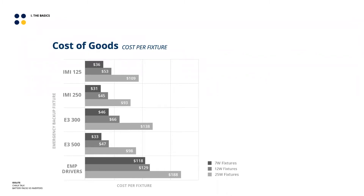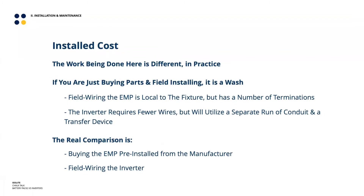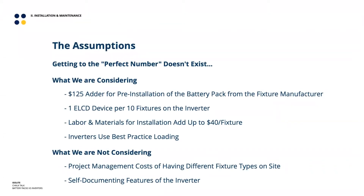This is a good way to look at it if you only care about the actual PO value of these devices, but it doesn't account for things like breaker selection or option selection on the IMI. Most importantly, it doesn't account for how you actually get this into an installation. Total installed cost is really what we want to focus on, because the work to get these into the field is fundamentally different.